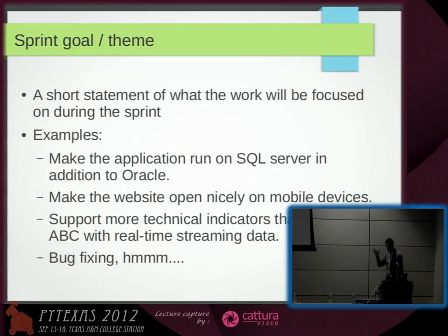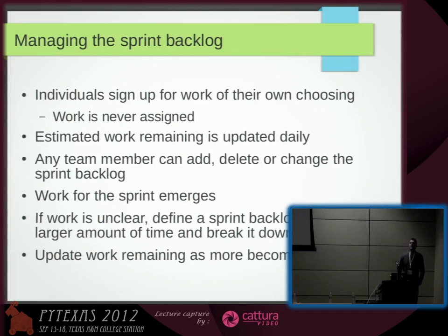So bug fixing, it's an ongoing activity, meaning whenever you find a bug, depending on severity and all that, it can become a part of the backlog. So that can be an item that goes into a sprint. But you typically don't want to have sprints, sometimes they call it a stabilization phase. That's usually a bad sign, meaning that whatever we were doing in the previous iteration was not a potentially shippable product, or we were accumulating what's called technical debt. So bug fixing is done within a sprint. Typically, that's the design. That is the idea.